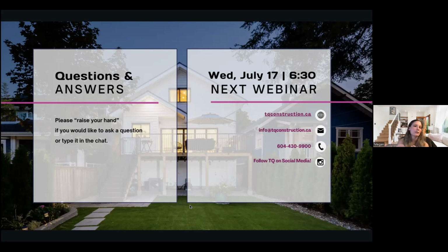And the same thing goes for other professionals as well, whether they're energy consultants or arborists or anything along those lines, your building consultants. You're going to reach out to them once you have a more clear idea in terms of what your scope is and things are a little bit more fleshed out. And then they can help you hone in on the details and ask any questions that might really affect the design, and small things might need to get moved around. A lot of those consultants you want to deal with once you have a floor plan that you're pretty comfortable with, and you're ramping up and getting ready to move towards prepping for a building permit or prepping for construction.